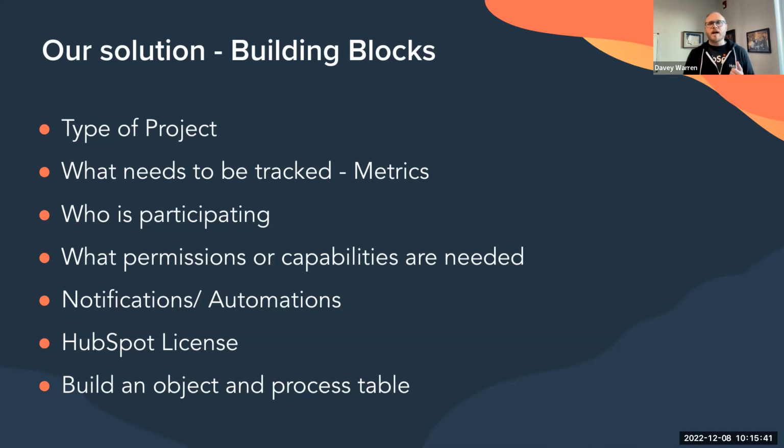We look at total projects. You'll see a few things about how many hours we have available, how many hours are in the queue or in progress, and just constantly trying to keep track of where things are at. It really helps our operations manager to evaluate when we need another body that we're going to hire. We've been planning this out. We've been looking at our burn rate and our current hours and saying, okay, we're going to bring in a body by January 1, and then we're going to need another person by February 1, based on the workload of projects that are coming in.